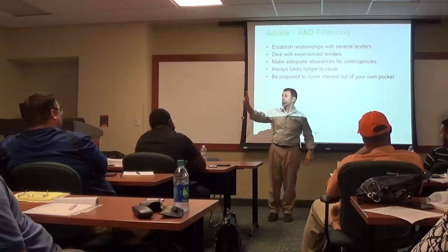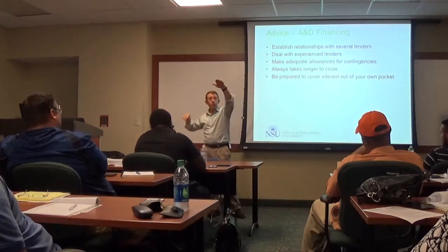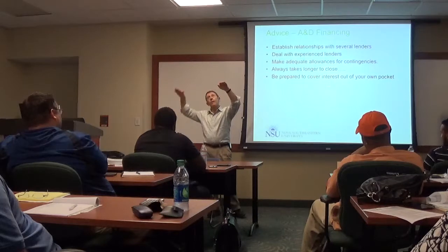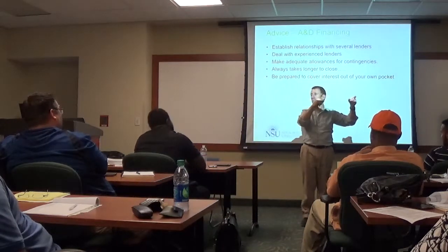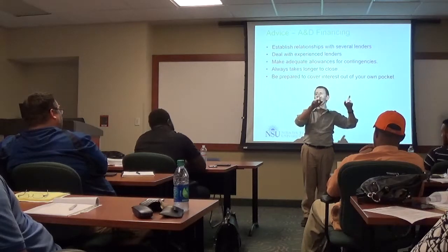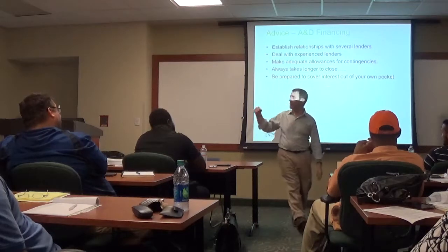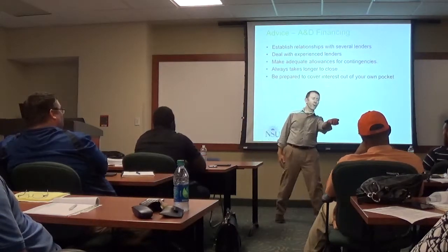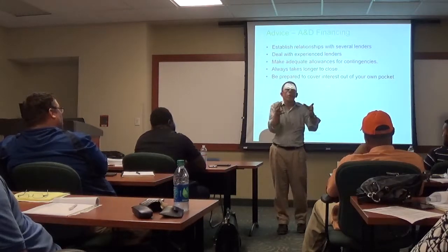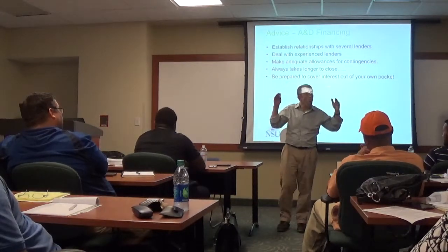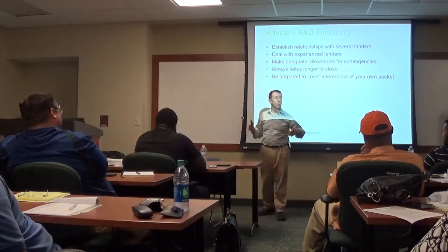That wasn't their profit. Remember, their profit is the difference between the value of the building going in and a higher value, lower cap rate on the building going out. That was just basically paying them for the work they're doing. It's a development management fee. And so all that, yes, is the total cost of the building. When you look at our example problem, we said we're going to rehab a building, $350,000 to buy it, $100,000 for the rehab. So what are all those costs? That's the cost that you hope the lender will lend against. And when you're looking at loan to cost, that's the budget.